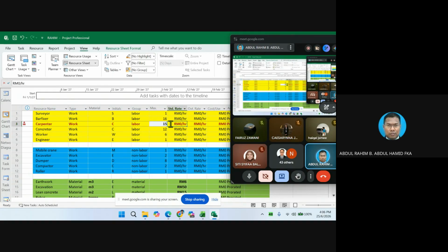What is going to happen? Is it still there? In such a way you increase the resources. Let's increase into 16. Oh, it looks like it is okay. So in your file, you are going to change this thing from 14 to 16, and the red man basically disappears. And you are going to click save file. So you are done with the file in the original folder.